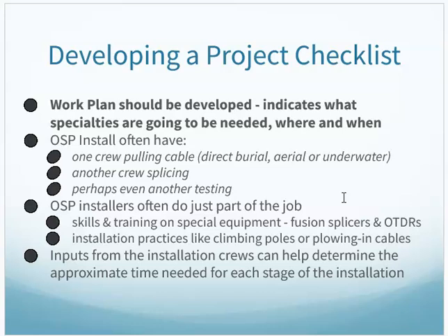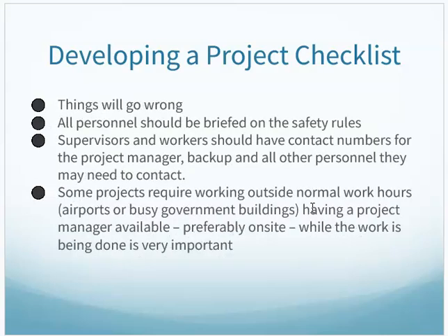Again, I kind of mentioned some of those things just a second ago. I might have one person cable pulling, another splicing, and maybe even another testing, or it might be somebody in the same crew that's doing the splicing is also doing the testing as well. So there might need to be special installers for special parts of this, and that would need to be scheduled and arranged so that they're there at the appropriate time. We're not sitting around waiting for them.